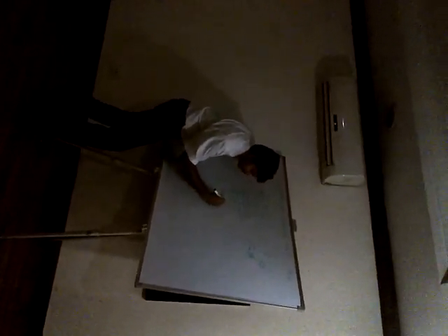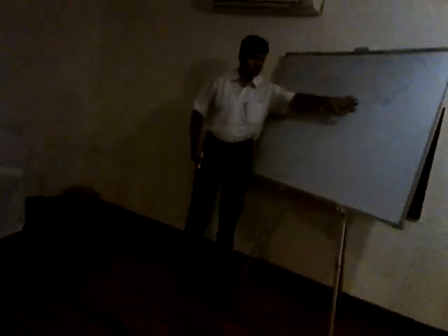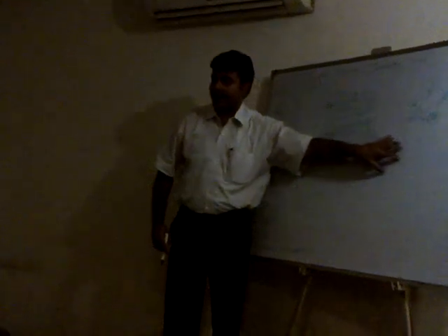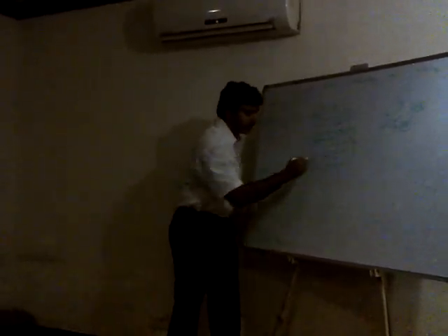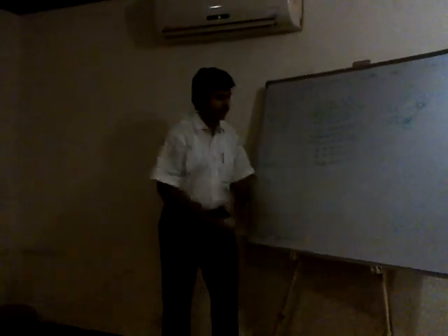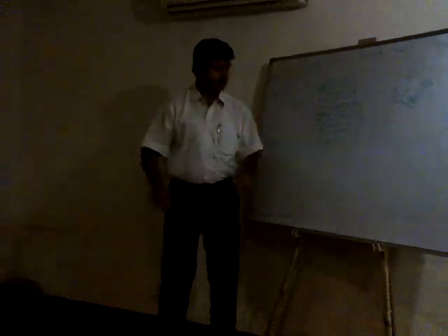Develop schedule. In order to develop the schedule, what happened? You had the outputs of all the previous processes: schedule management plan, activity list, activity attributes, project schedule network diagram, activity resource requirement, activity duration estimate, resource calendar. They were all fed as input for developing schedule, and you came out with your schedule baseline. Clear?